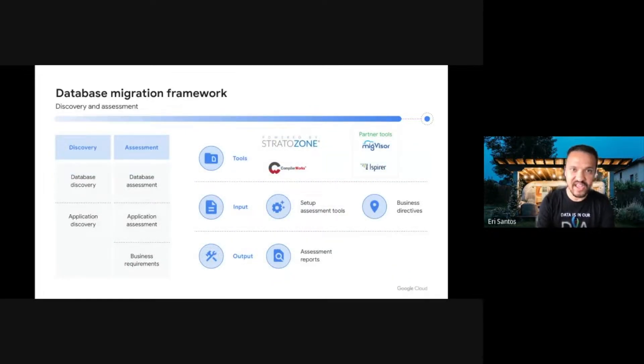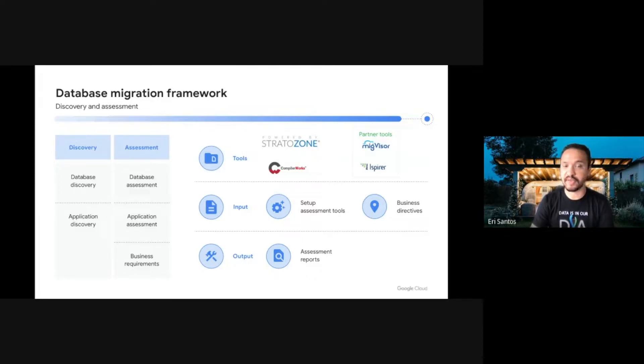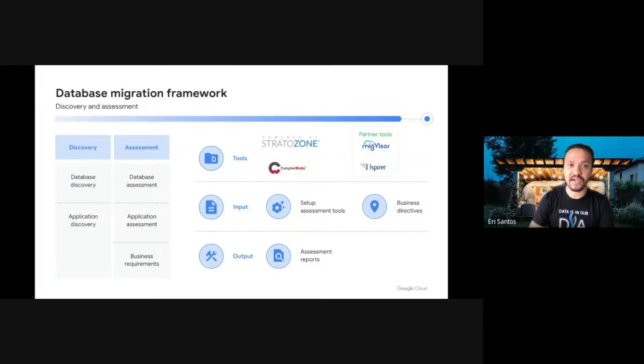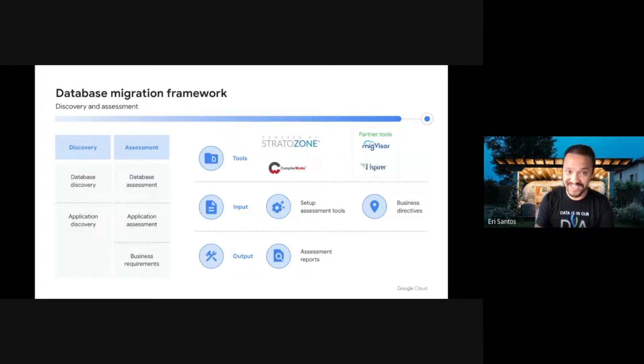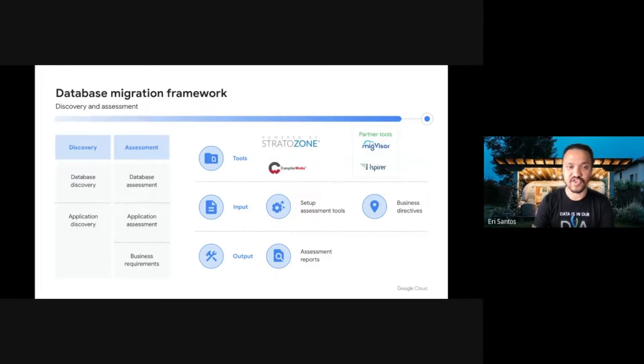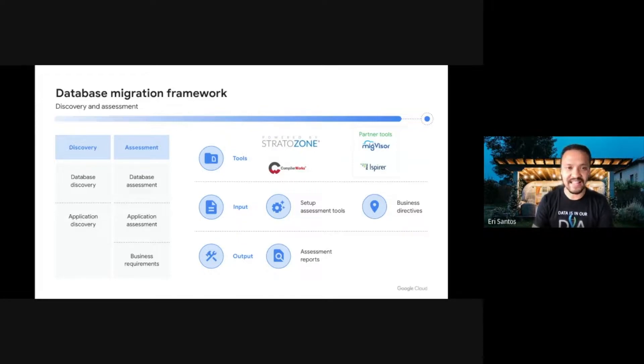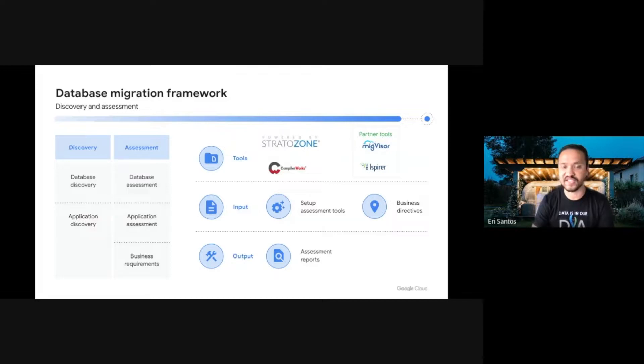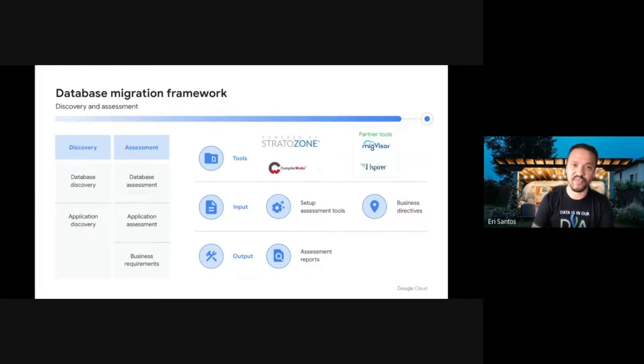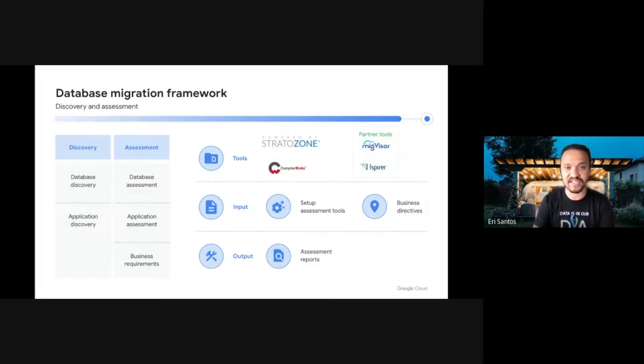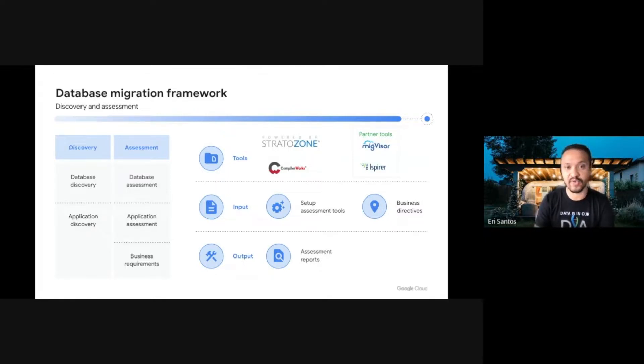Discovery and assessment are the very first steps of any migration planning. Discovery simply means what are the applications and databases that I want to consider in scope to migrate. Assessment is the exercise of understanding all the characteristics of your databases, such as size, version, RTO and RPO requirements, allowed downtime, CPU memory and IO requirements, and so much more. Once the assessment is done, an assessment report is generated. This report provides meaningful details on applications, databases, and infrastructure, which will be used for the next steps of our framework.